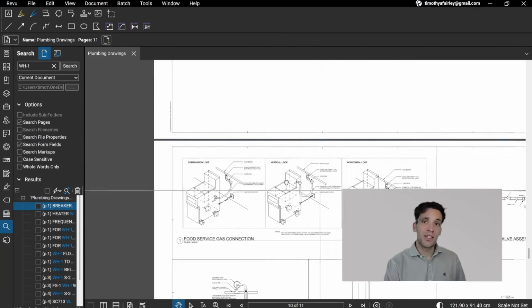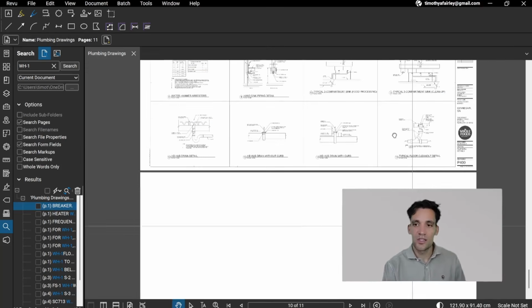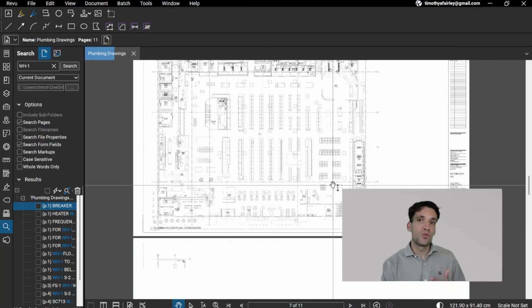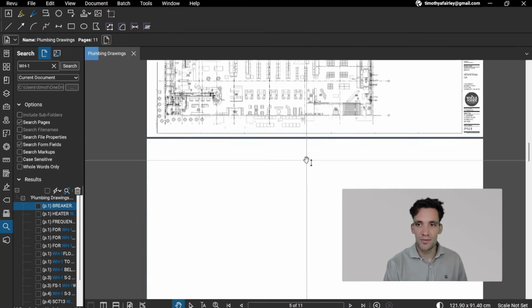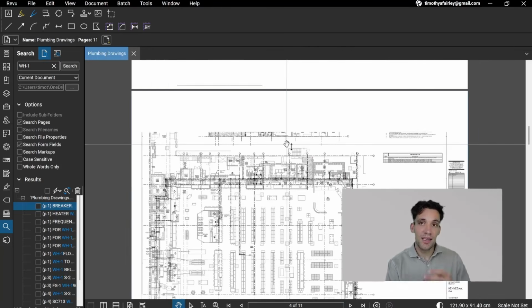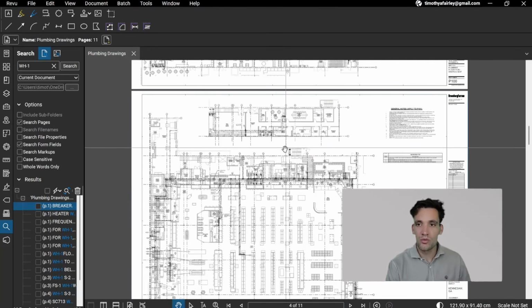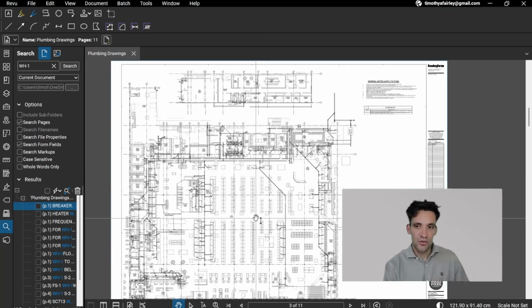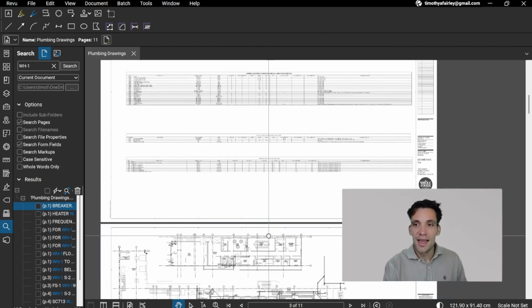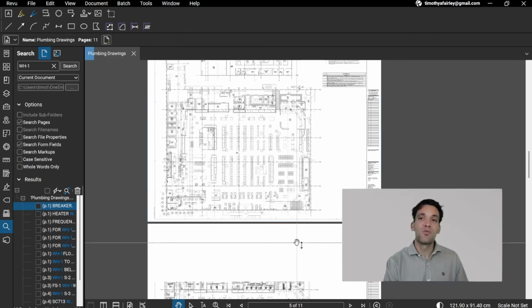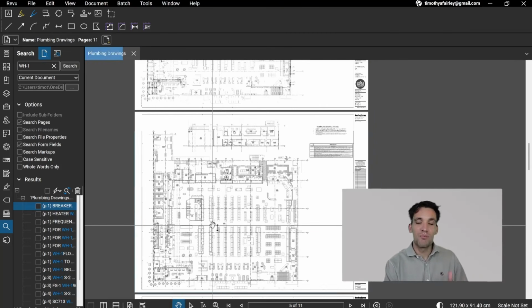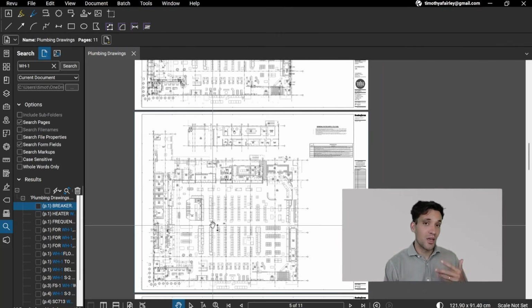Okay, so how are you actually going to use all this information and turn this into a full bill of quantities? Well, number one, you need to work out what you need to measure. So for us, this is going to be for the different trades, so cold water, hot water, plumbing. We're going to need both the counts of all the fixtures, fittings, and units that we're installing, and we're going to need the lineal meters of that. And then we're going to need to work out our assemblies. So an assembly is, if you think of measuring the lineal meters of pipe, what I refer to as a primary quantity.